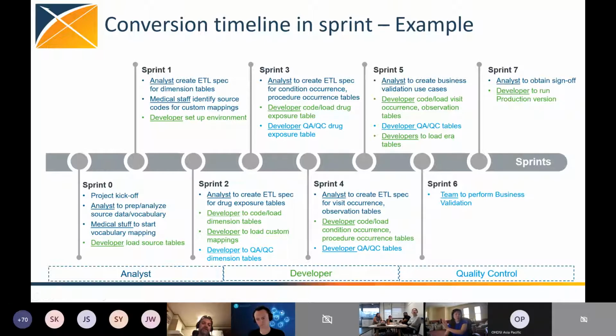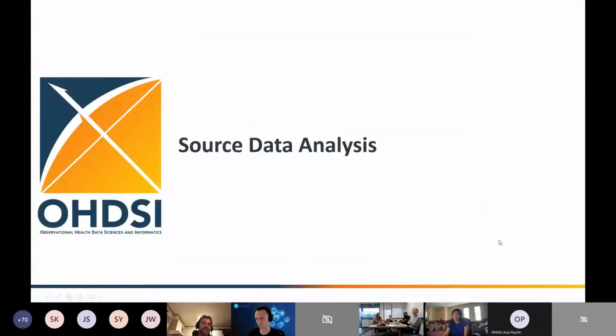Or we figure out, project management wise, what scope can be reduced to make sure you still hit the deadline, or do I need to bring in more resources? So it allows us very quickly to shift things because every 2 weeks there is a targeted deadline that we're hitting. Okay. I've hopefully answered all the questions around Agile Scrum.